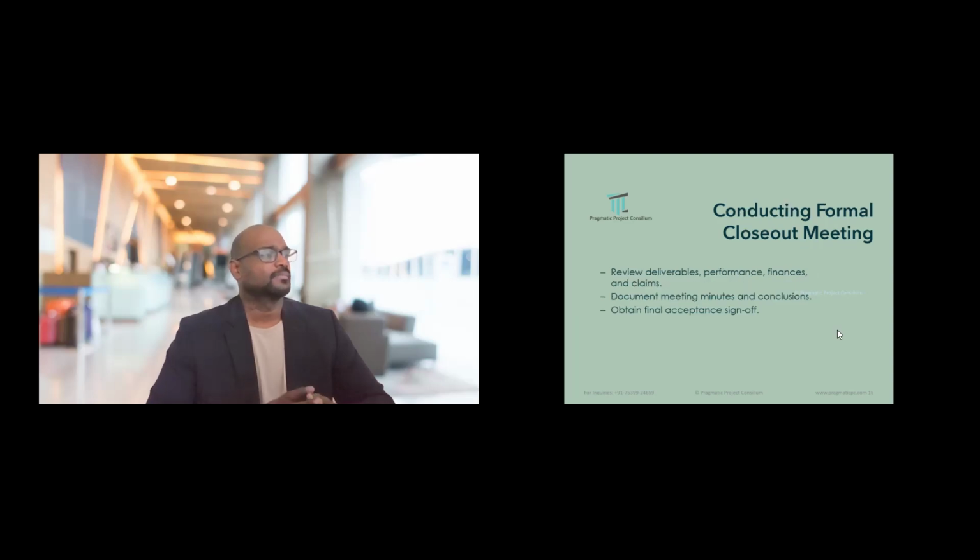So closeout meeting preparation. So this is similar to a kickoff meeting. Kickoff meeting is very famous, but closeout meeting is not famous. Most of us don't know that there is a closeout meeting. So create an agenda highlighting the key closure points, identify the issues that require a discussion, prepare summary of the contract performance.